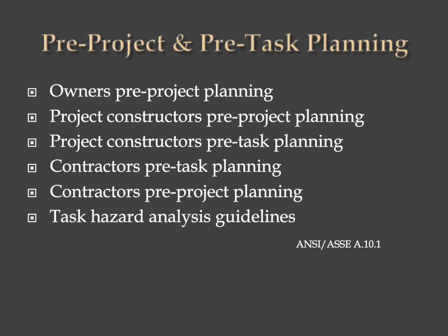He needs to have a meeting with the owner, the engineers, and the architects to decide what he has facing him. And then he needs to break that job down in order to bid the job, to make sure he's going to make money, as well as that the job is going to be run safely. So during his normal planning, he does break that whole job down. What he also needs to do in today's environment is outline what the safety plan is going to be.